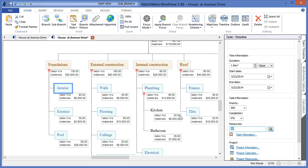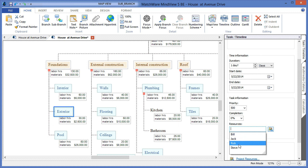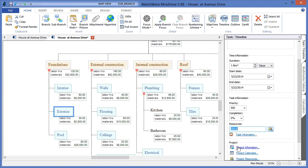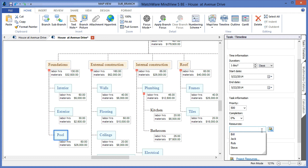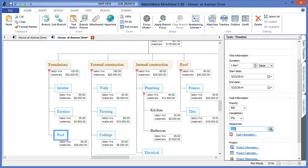I move to the next task that I need to assign, left-click on the item, choose to apply that information, and designate the individual resource or multiple resources. I continue with the final task, and as you can see, we have now associated task information.